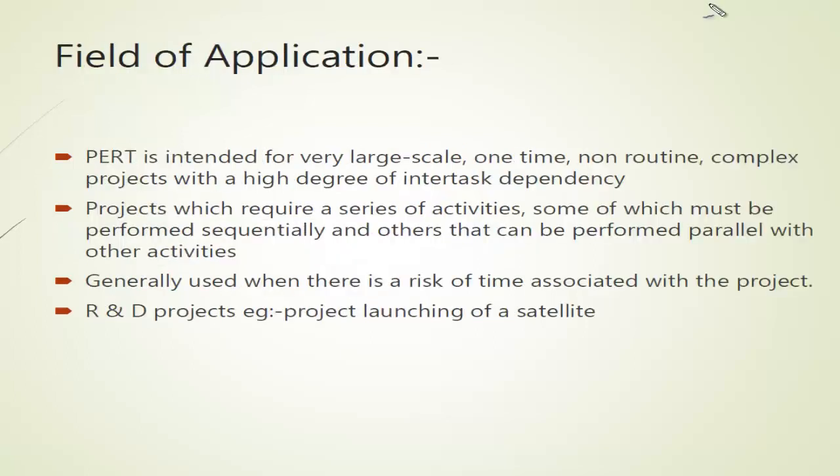Now, where is PERT used? What is the field of application? If you have a large scale, one time, non-routine project, which means we have not done it before, it is just a one time thing, and very complex projects with a high degree of inter-task dependencies. And there are inter-task dependencies, right?